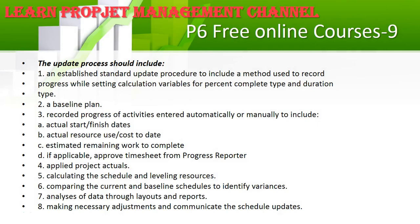The update progress should cover all of that, and there should be a procedure in your company's system about how to update the schedule and how often. There is an option in P6 to update your schedule automatically, but I don't prefer that — use it only when your actual work matches your baseline exactly, which rarely happens. Our focus will be on manual updating: actual start and finish dates, actual resource costs, estimated duration to complete, and project actuals.